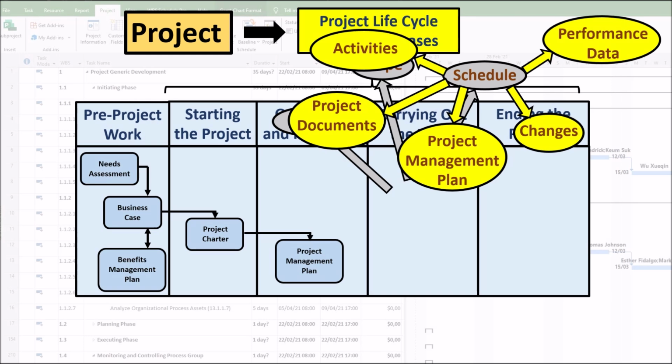6. Risk register. The risk register and the risk response plans within it can be updated based on risks that may arise due to schedule compression techniques. 7. Schedule data. New project schedule network diagrams can be developed to display approved remaining durations and approved schedule modifications.